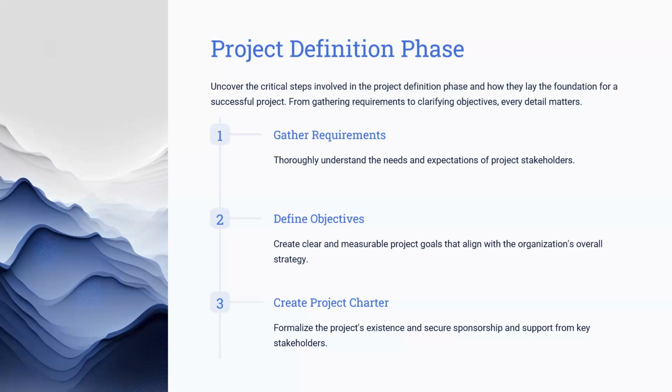Gather all the information which is needed for the project. That is everything: how much money has to be incurred for the project, what should be the timeline, what is the deadline for the project, what are the expectations of the stakeholders, who are the parties to be involved, how many team members, who is going to be the project leader, and what is the objective, the goal of the project.